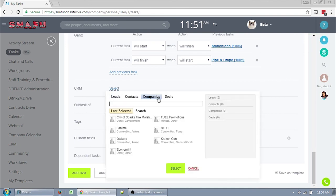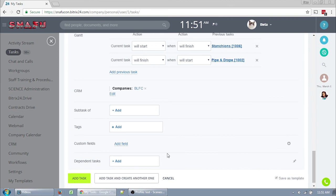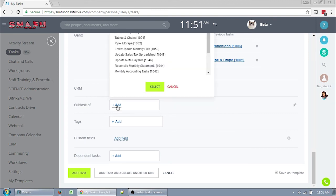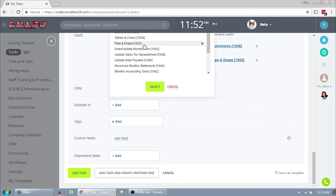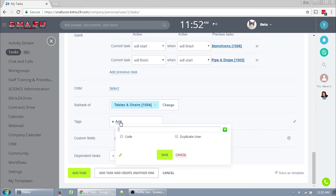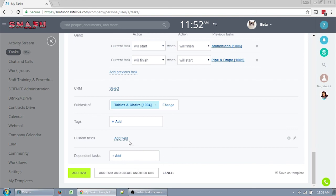The CRM works the same as the template. Click select to attach this task to a company or contact. Subtask of works very similar to how it works in the template, but you can only attach this task as a subtask of another task, not templates, which makes sense, I would hope. It makes the current task a subtask of whatever task you choose. This is really useful for hierarchical organization, and you can collapse subtasks into the base tasks. I like to use subtasks a lot when I can. It makes everything just a lot easier to handle when you have a lot of tasks. Tags in the task work the same as tags in the template. I'm not entirely sure how useful they are. Custom field works exactly the same way as in the template, and I'm not entirely sure we'll be using it.